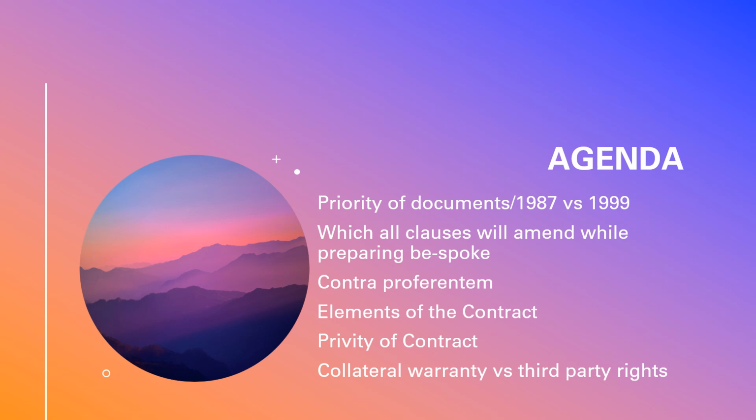Third party rights is a provision within the contract. Okay. So let me give a simple example. You can see in the FIDIC form of contract, the instruction can be given only by the engineer. Okay. Or, if it's a MEP subcontract agreement, it might mention that instruction can be given only by the main contractor, because in a subcontract agreement they will mention contractor as this, subcontractor as this, employer as this, engineer as this.